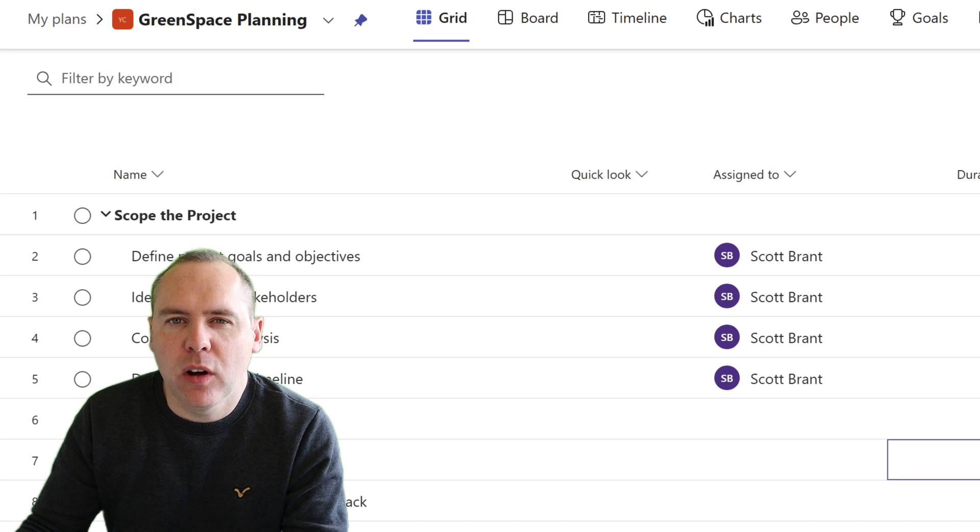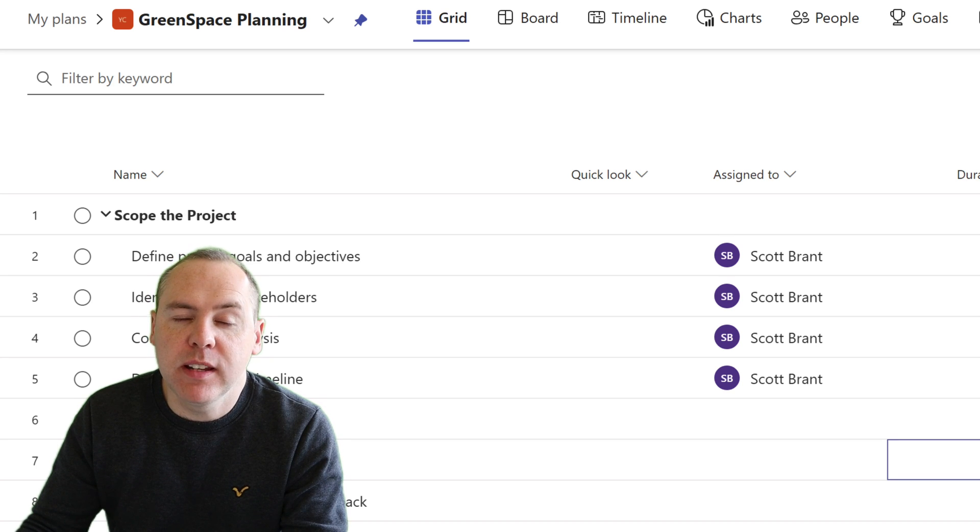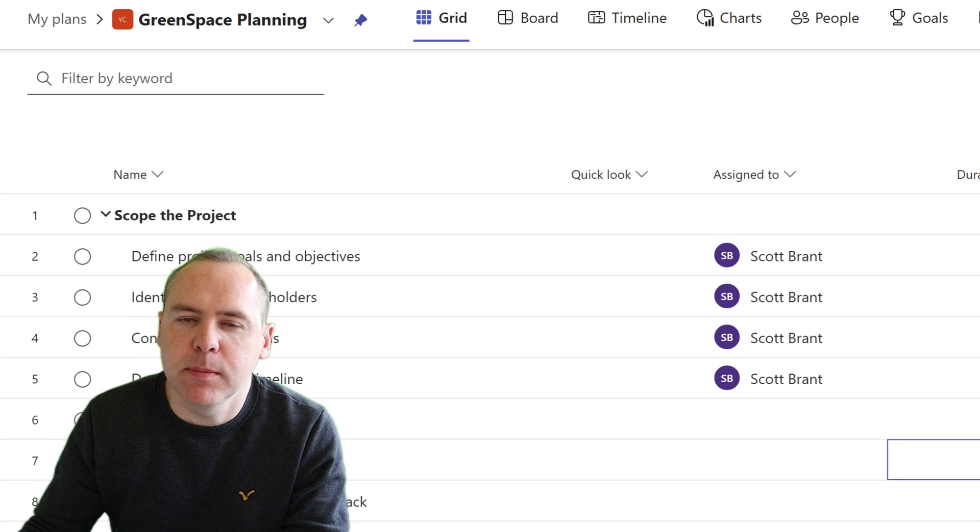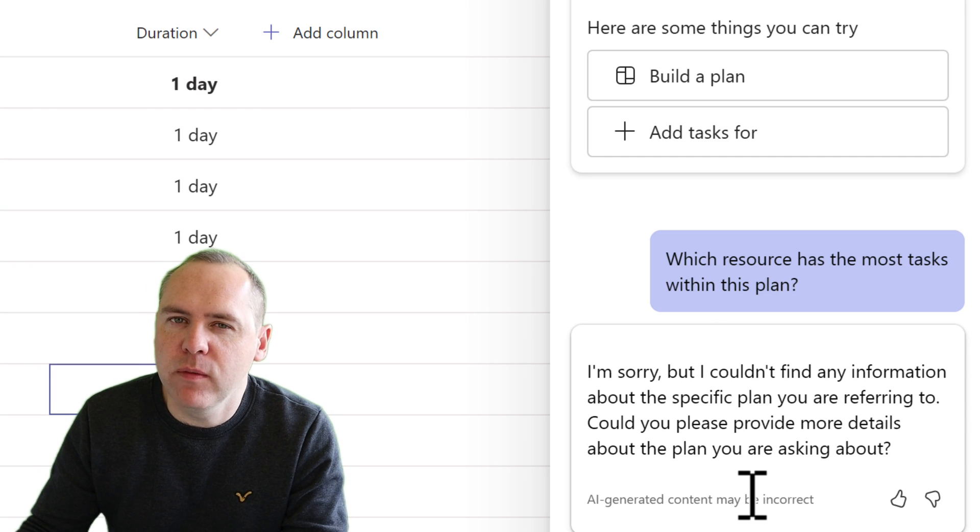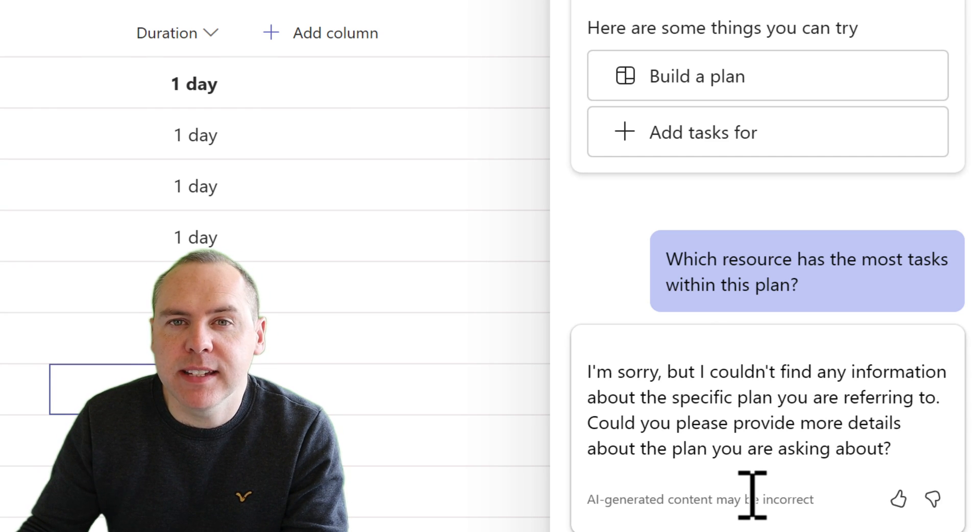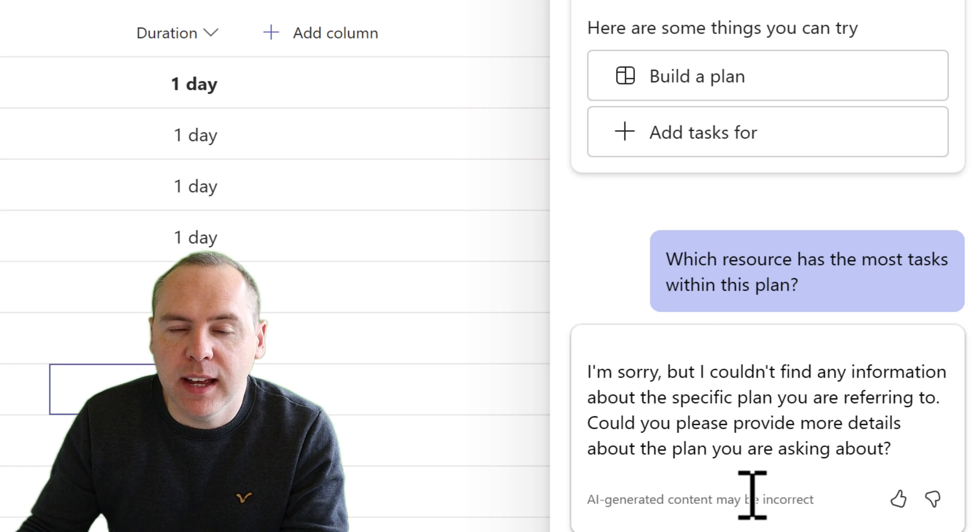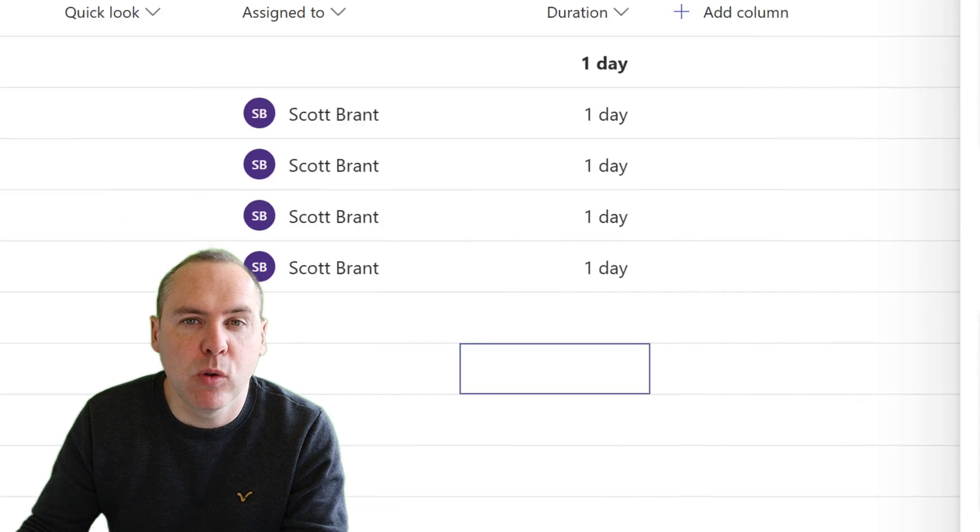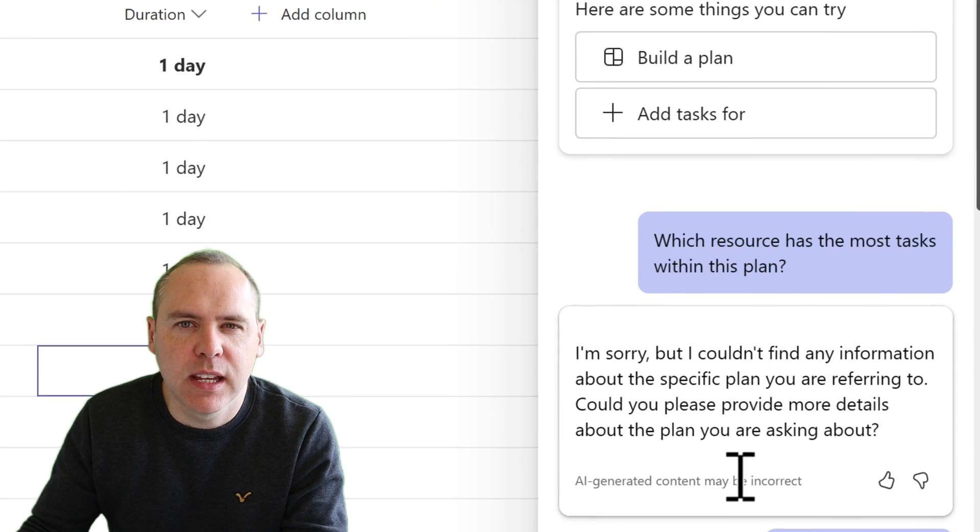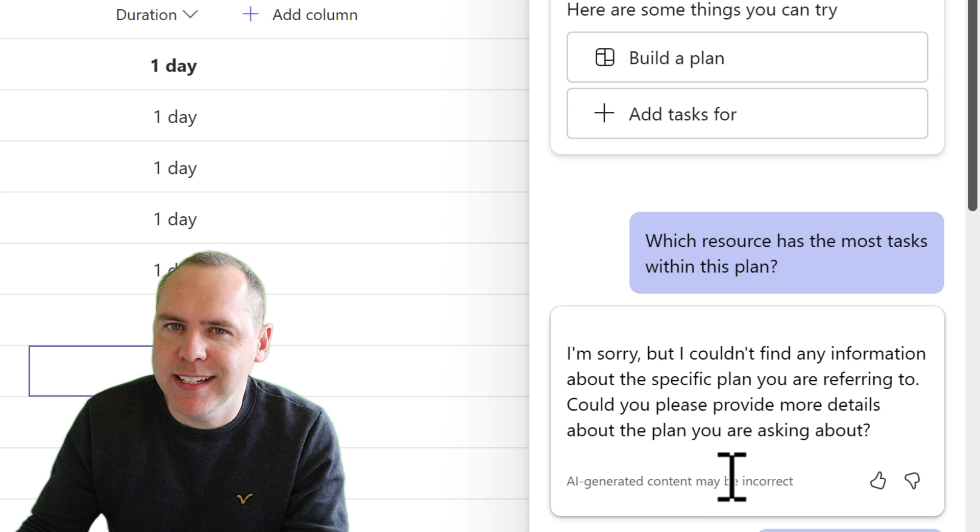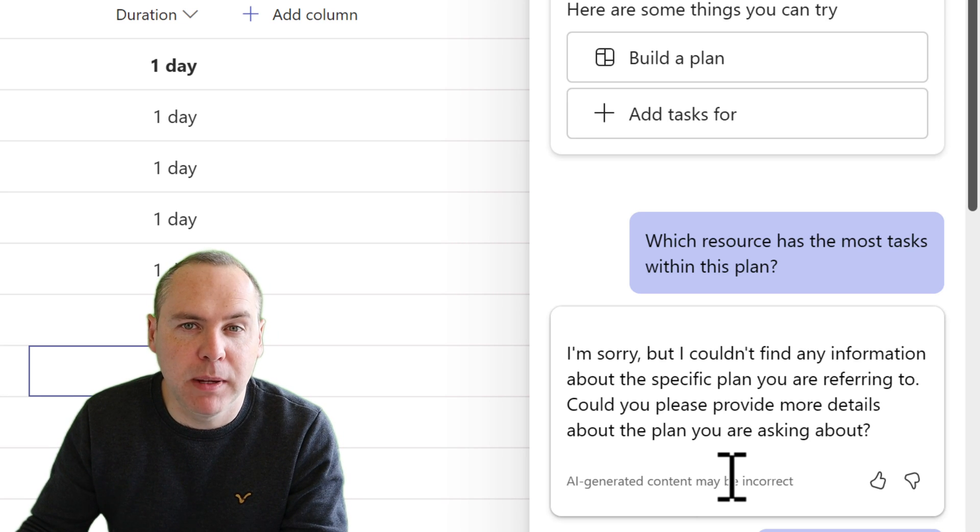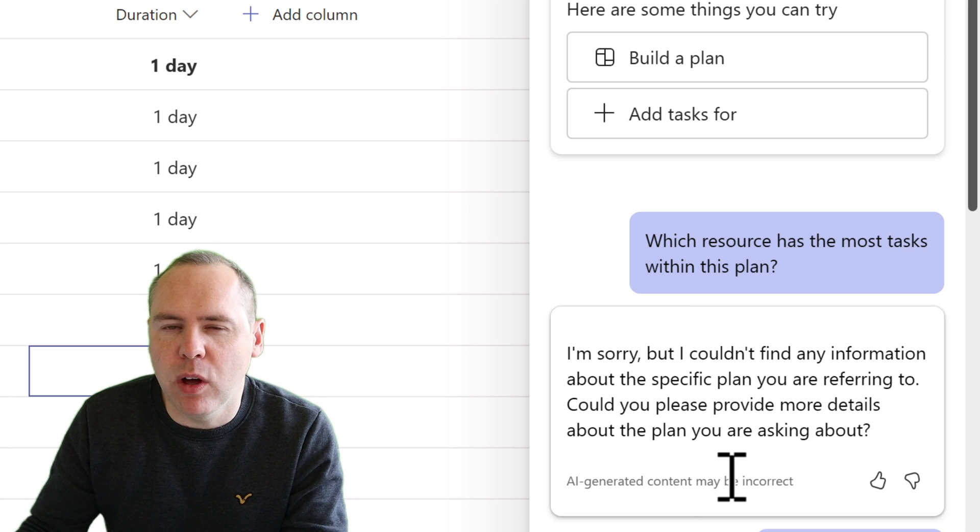So can Copilot help us with resource management, understanding who has most tasks in this plan? Now as we can see here, I had a conversation with Copilot about this plan. I simply asked it who has as a resource most of these tasks assigned. And actually the answer would be easy. It's myself. I have four tasks in the plan. No one else has any tasks. As you can see, Copilot was unable to find any detail in the plan about resources, which of course is a big limitation. It then asked for more detail on the plan. And I gave it the plan name.